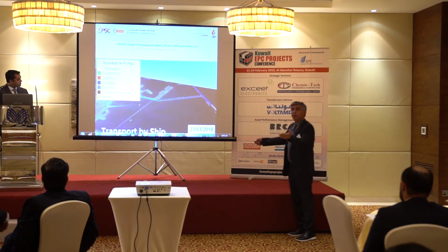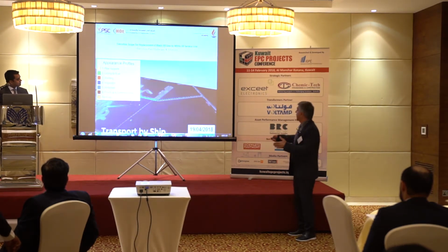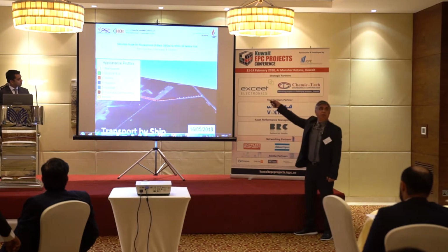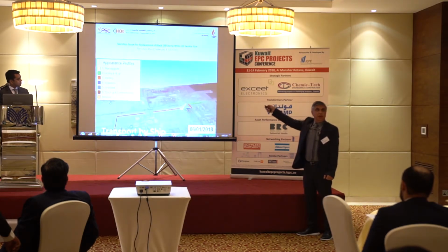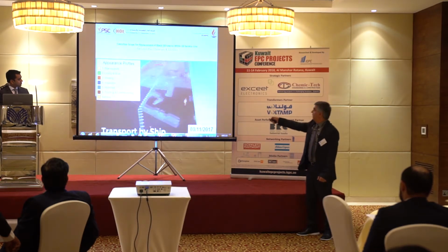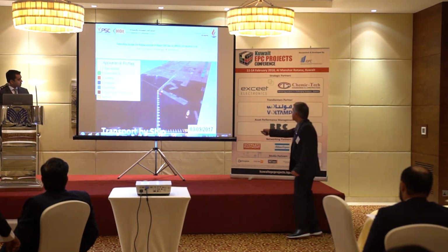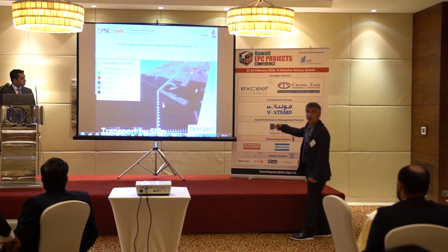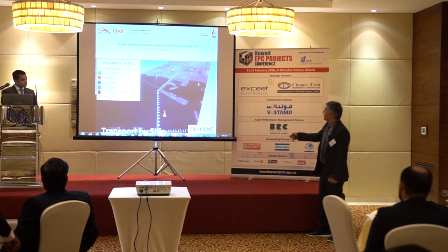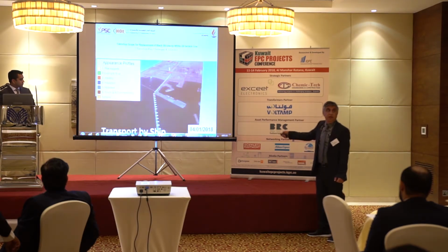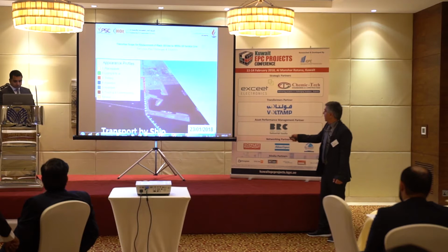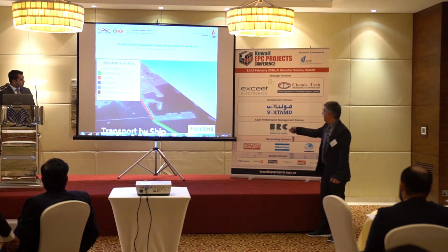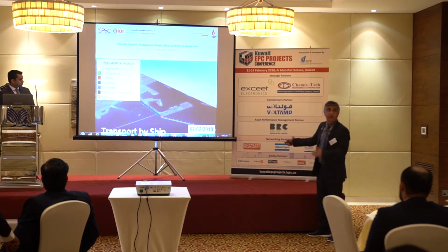All the demolished pipes will be transferred to the tugboat and taken to the port, instead of going back to KMPC as in the first video. This is the barge, this is the tugboat. We'll take all the demolished pipes directly to the port. So this will give us at least a very good time saving for this project. As you see now, the time is almost half.